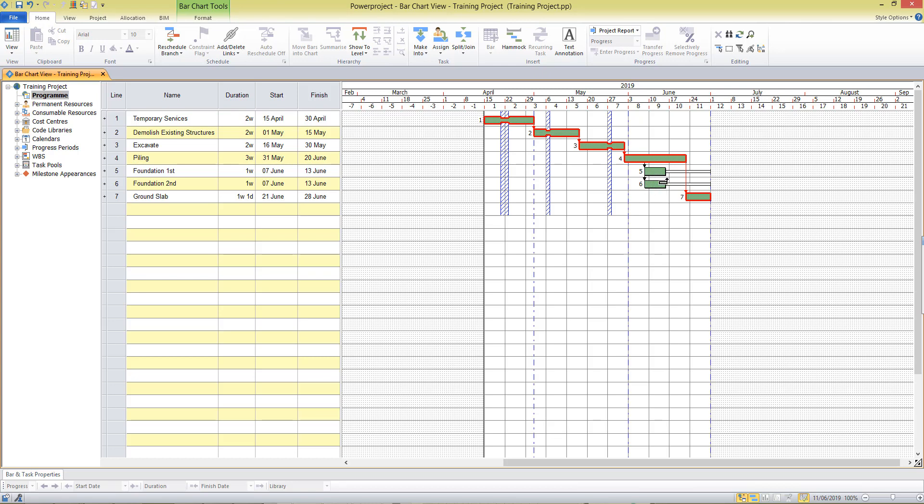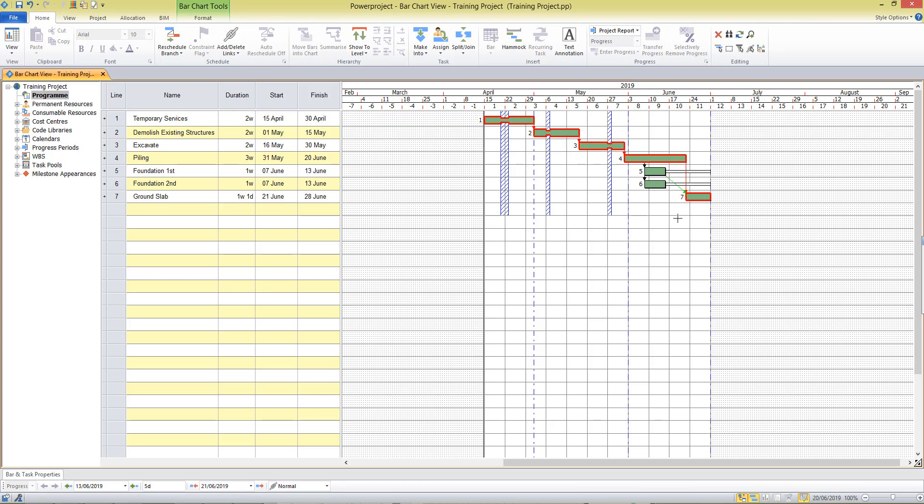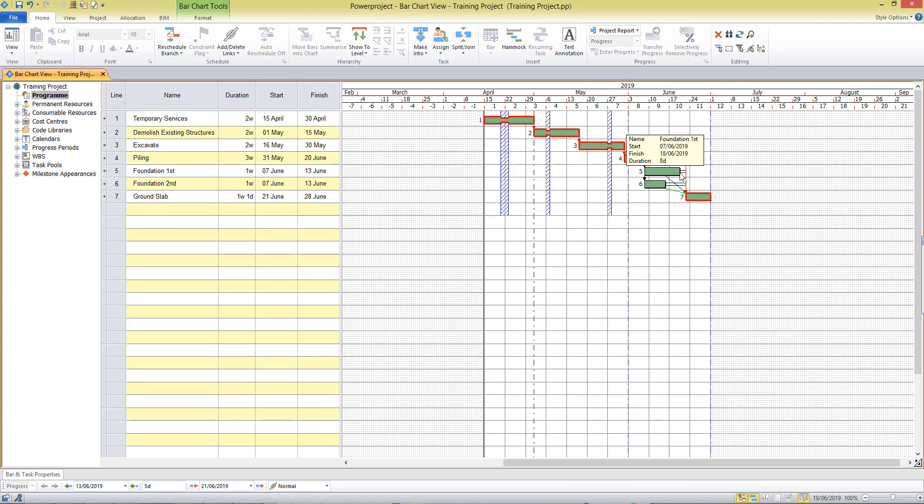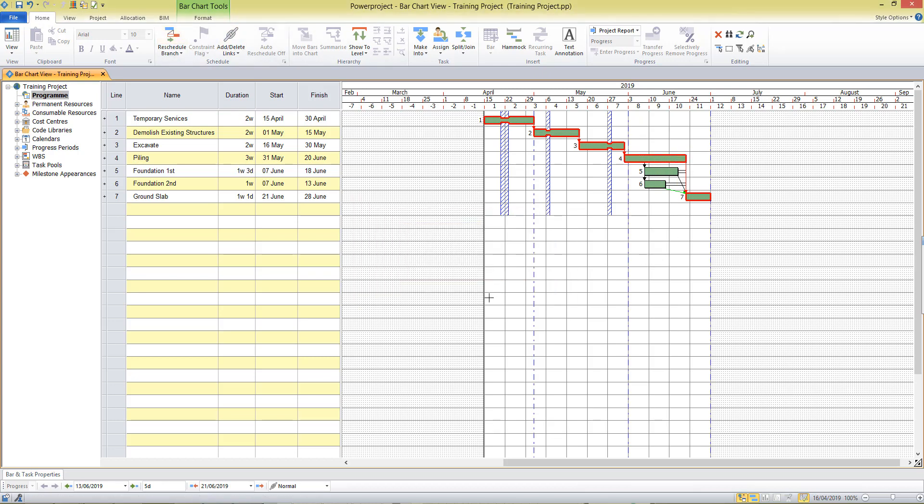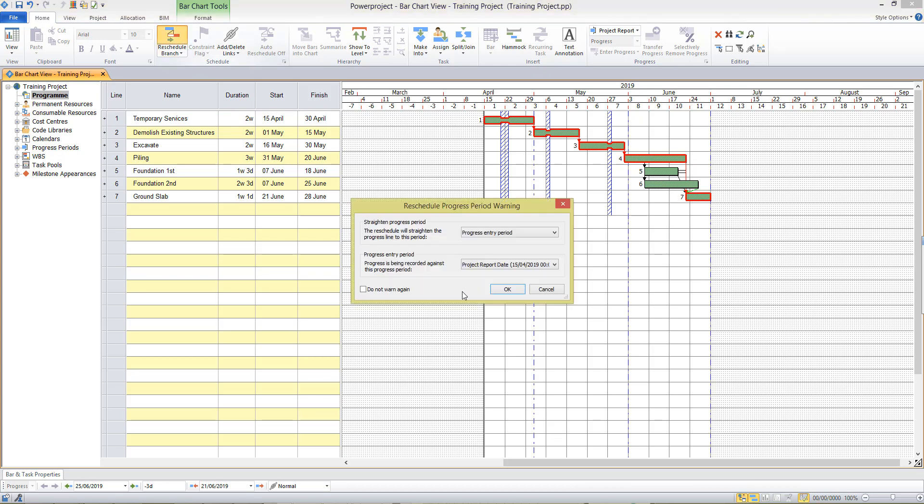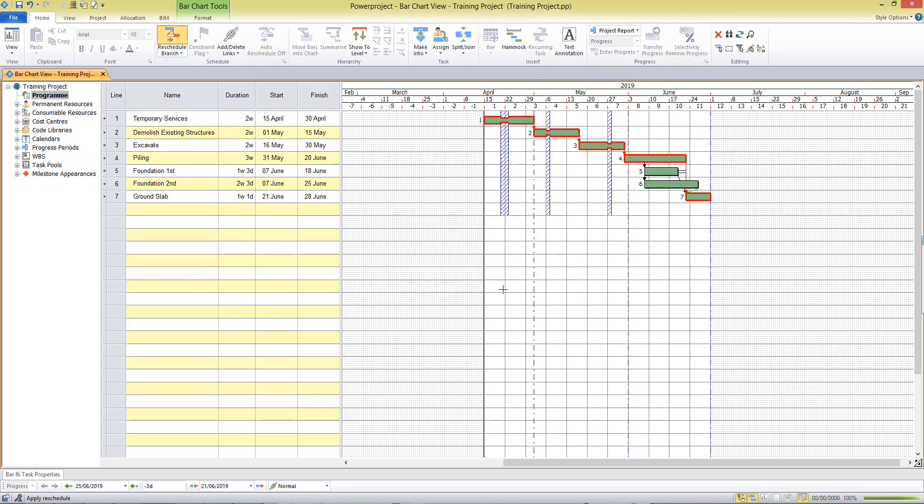If I just tie up the ends of these tasks I want to show that the foundations do have a relationship to the ground slab and we couldn't start that activity unless we completed the foundations. When I reschedule you see the float period has been reduced there. That's showing me if these tasks were to be delayed within the float period that would not affect my critical path or my end date. But if they were to be delayed past that date they would become critical and by definition affect the end date of the project.